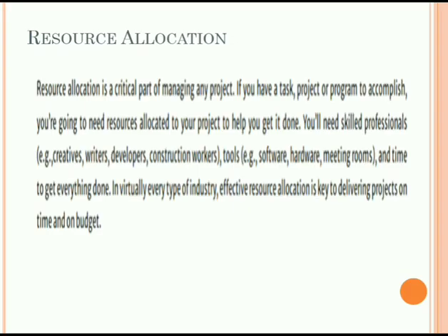In detail, we can say resource smoothing is one of the project management tools used in resource optimization techniques. It is a technique which adjusts the activities of the schedule model so that the requirements for the resources do not go beyond the predefined resource limit. Basically, it is an action of adjusting the activities in accordance with the resource limit. It is used when the time constraint takes important priority in project planning.